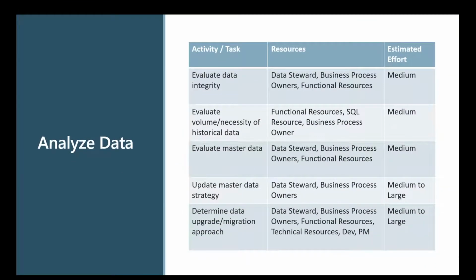And when we look at the level of effort for this, obviously, the evaluation of the data integrity, I would say most of these are medium to medium large, right? So we're looking at the data integrity. We're trying to establish the volume: 10,000 orders a day, 1,000 orders a day. We're trying to evaluate the master data and the fields that have been added to it that drive the process data you may have. For example, on customers, you may have added custom fields that need to flow to a sales order. What is the requirement for that? We want to understand that, and what the master data strategy around it is as well.